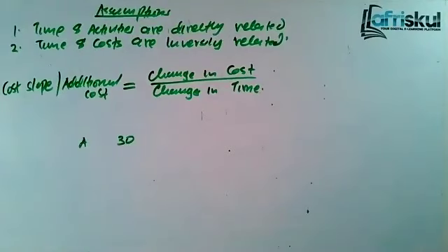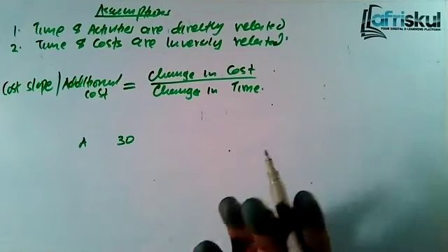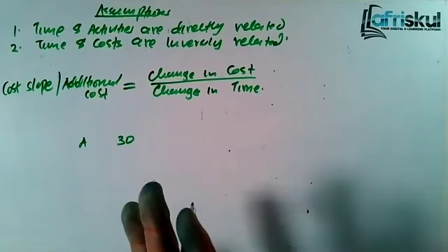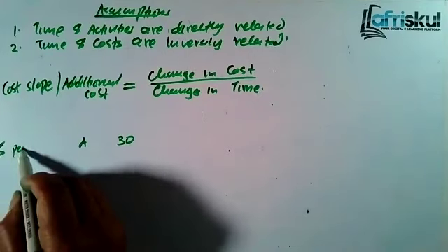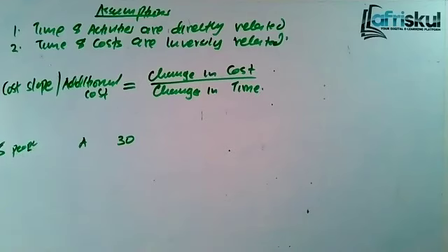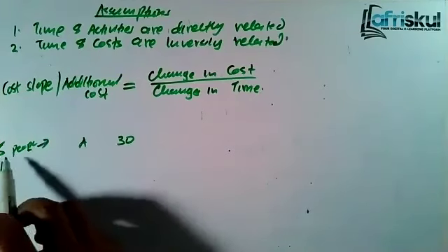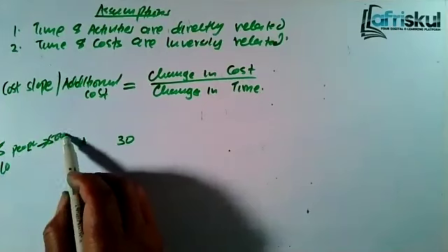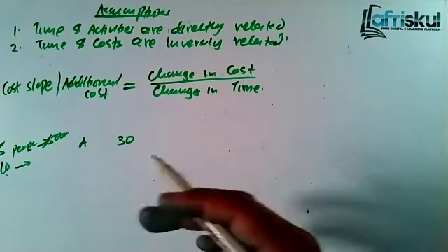But if you crash, if you want to finish faster, for example, this is what I mean by crashing. Assuming you have a construction project, and for this project, you usually employ 5 workers. But now the owner has told you that I want this project to be completed within 2 days. What can you do? Instead of hiring 5, you can hire 10. If you are paying them a salary of 500 per day, what do you expect to pay 10 of them? So the salary will go up. That's what we are saying.